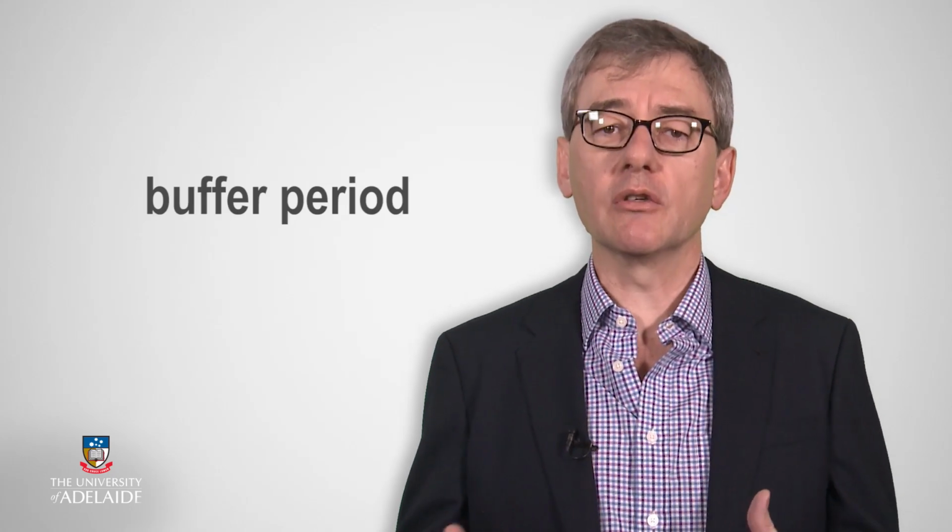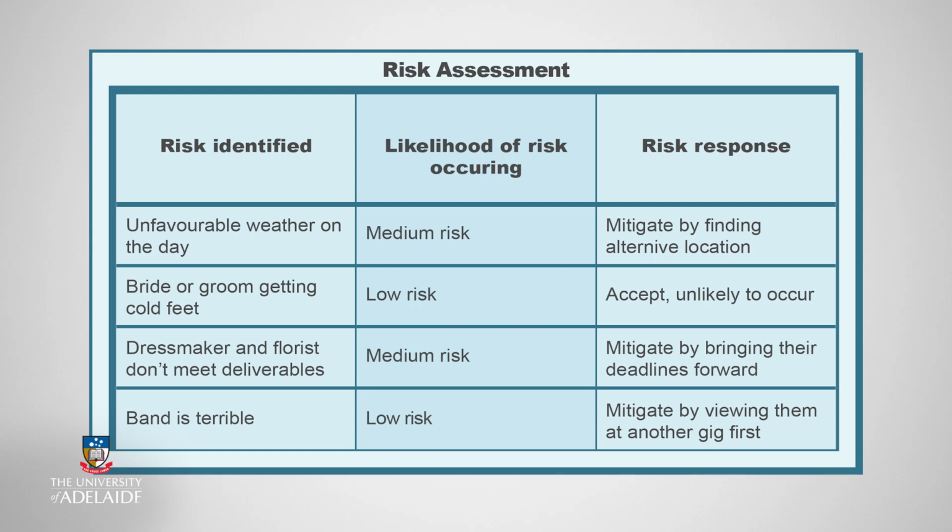It is wise for any project manager to build in a buffer period to consolidate any external supply deliverables before the date they are required in the project. This is even more so when the specific deliverable has a knock-on effect. In other words, where one activity is dependent on another being completed, thus causing delays on the critical path. Clearly, Anne will benefit by using a systematic approach to ensure her risk management plan is sufficiently robust.